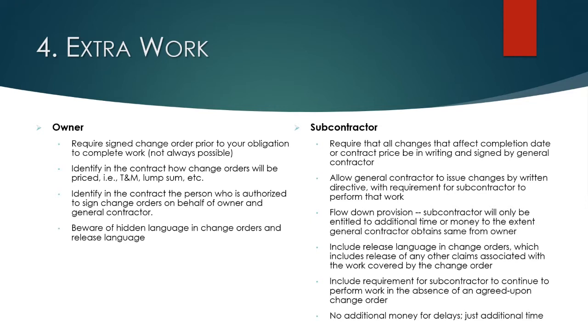The owner is going to wave that document in front of you in litigation, or subsequent to the completion of the project, or at some point, and say, look, you don't have a claim for X and Y and Z. You waived it with this change order because those claims predated that signed change order. So be careful of that.